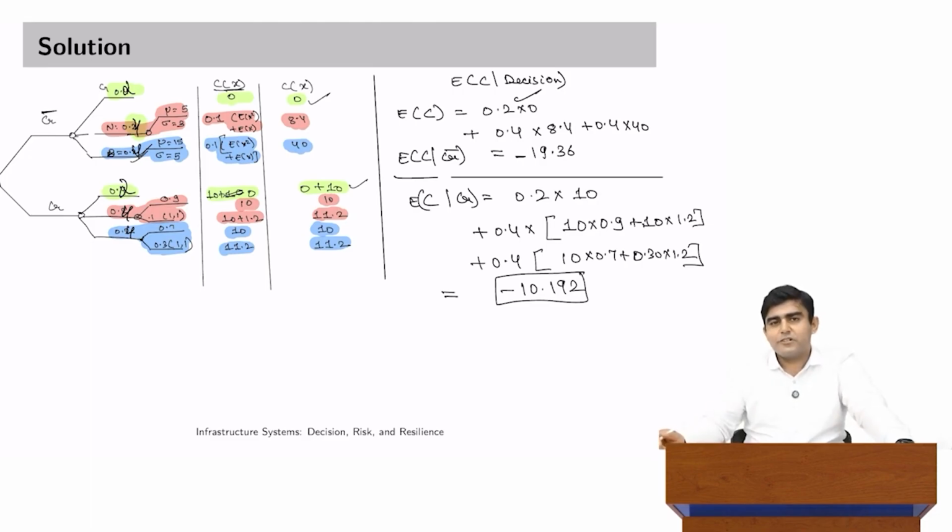Now, we started with so much information. Now, decision is clear to us that although prima facie launching a crash program appears to be an expensive choice, you would end up saving almost twice the money expectedly if the crash program is launched and more resource mobilization happens, because going with an assumption that weather is going to be good is against the odds based on the experience already.